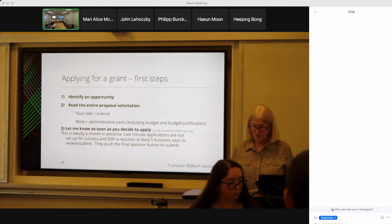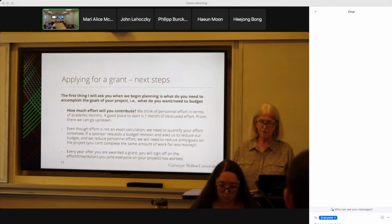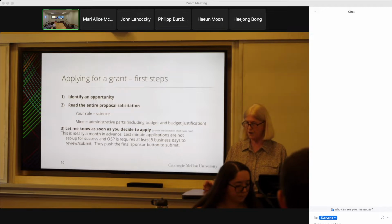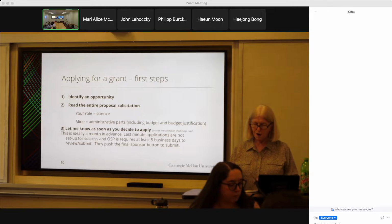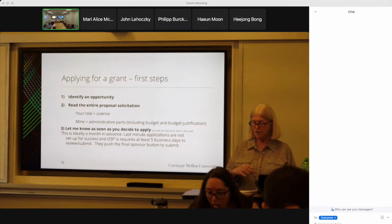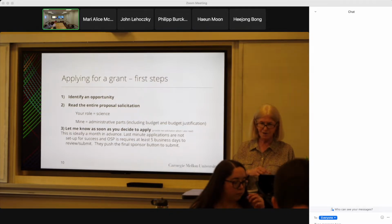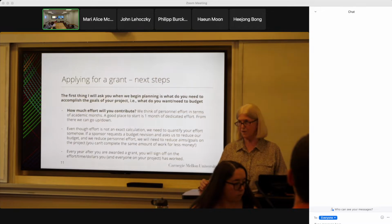And then once we do decide that we're going to move forward, hopefully we have about a month to work on that, because it's a lot of things that I need to set up. So one of the things I will do is prepare the budget for you. I can draft the budget justification, and basically we'll talk about the list of things that I need first, because when I do this, the first step, I'll build a budget for you, but I also have to then put it into a university system, Spark, they call it here, to make sure, one, it balances, that it meets all the compliance with the university, so I enter that budget there. And then on the third step, I have to go and put it into the sponsor budget, so 3 times it can be cumbersome.